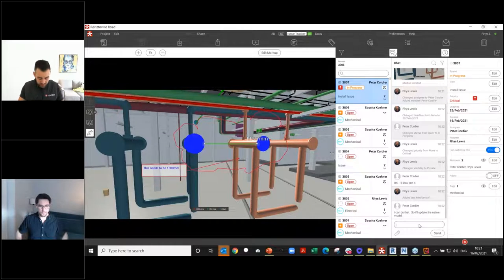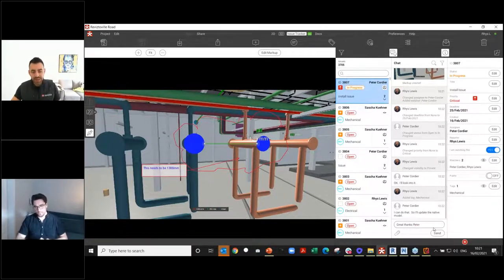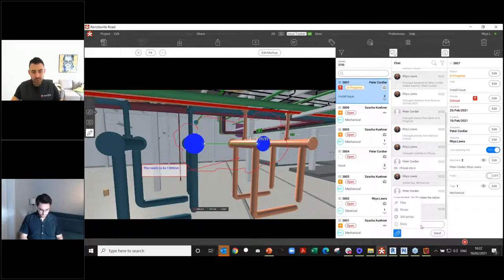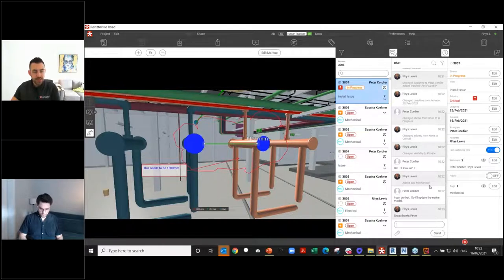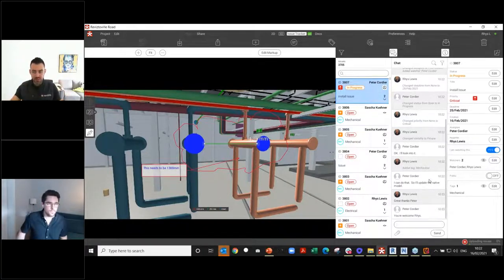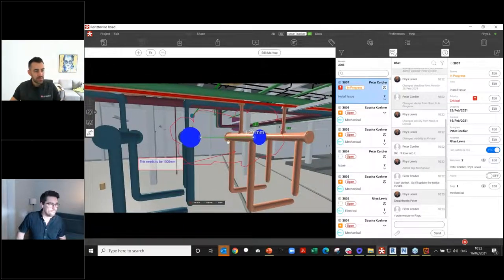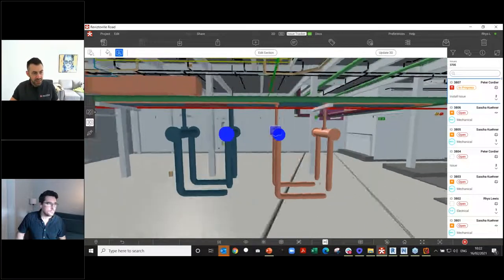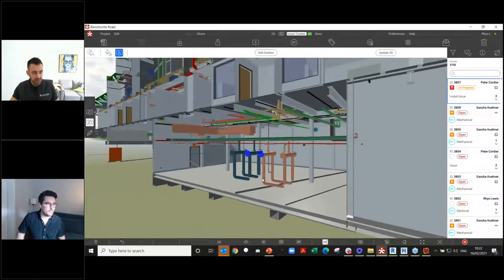This is why we call it the golden thread: all activity is logged. Whenever somebody added, changed, or updated anything, we can see the activity here. Peter has come online; it's been assigned to him and he's changed the status to in progress. He can't close issues out, only mark them as solved. It's my job to verify things have been dealt with. In the issue tracker, we can attach supporting documentation, photographs, 360 images, and documentation.